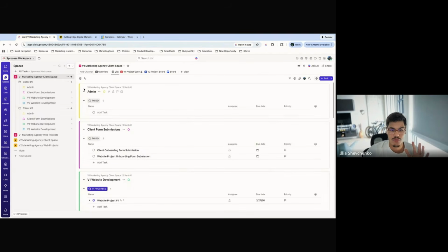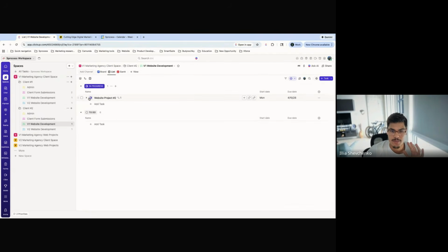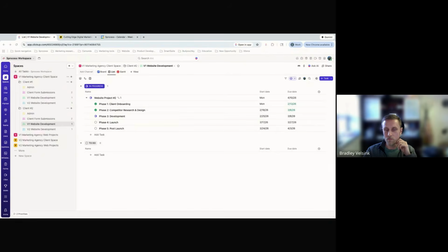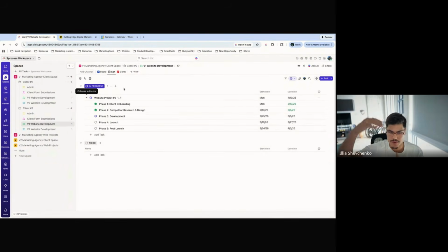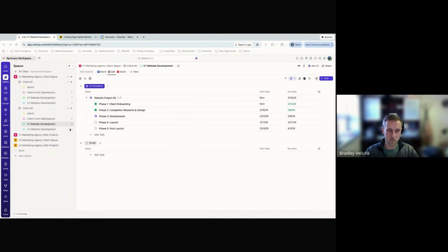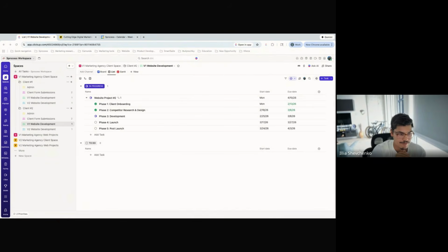So if we were to go this way, every time a phase ends, and I think that was the question you had last time, where you mentioned that you're including the dates in the contract for different phases. So again, this can be like a management part of the structure where you can set this up yourself, or someone from the project management team, and then just as the phase completes, you just move it to complete or done. If the due date changes, you update the due date here for the phase. But again, let me know so far if it makes sense.